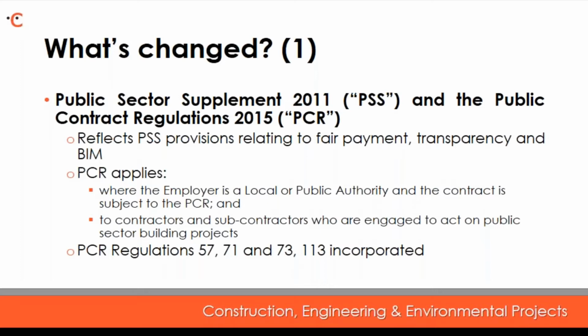And finally, Regulation 73 requires public contracts to contain the right for the employer to terminate the contract where there has been a substantial modification to the contract within the meaning of Regulation 72. The contractor should have been excluded under Regulation 57, or the contract should not have been awarded due to a serious infringement under European law, as declared by the Court of Justice in infraction proceedings.